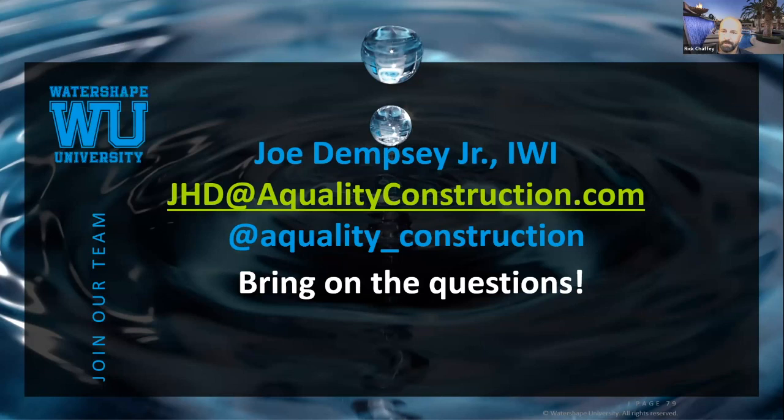Yeah, I know. So for instance, we review your plans in as much depth as possible. Then we produce our scope of work. And for this project, our scope of work for the pool and the spa, which is just our list of inclusions and exclusions, was probably like 15 pages or something. So doing it with a fixed price and defining everything that we include and everything that we exclude makes it so that there's no question of, oh, was Joe going to caulk the joint between the coping and the deck or not? It's listed in our scope of work. So we're not going to have those arguments, and us having to do something because we didn't say it was excluded and it was assumed we were going to do it.